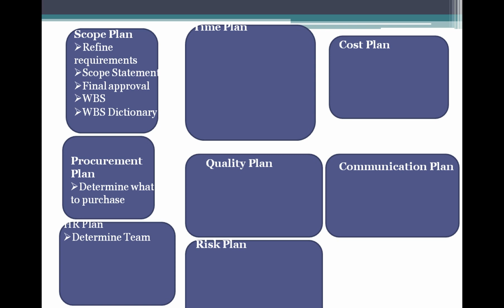So for each package, what are the requirements of that package and what is the cost involved, who are the resources assigned, he will update the resources responsible for this work package level, and what is the requirement ID associated with this work package and what is the cost involved. So all these details the project manager updates in the work breakdown structure.